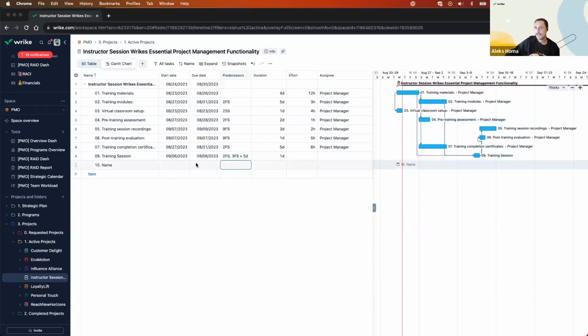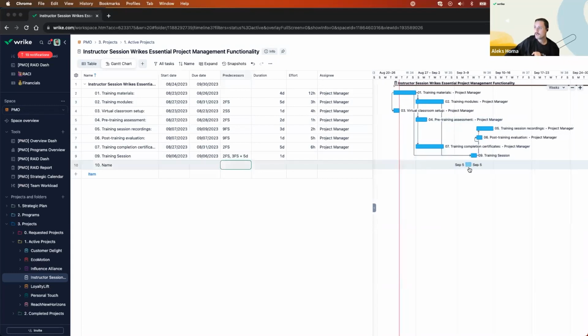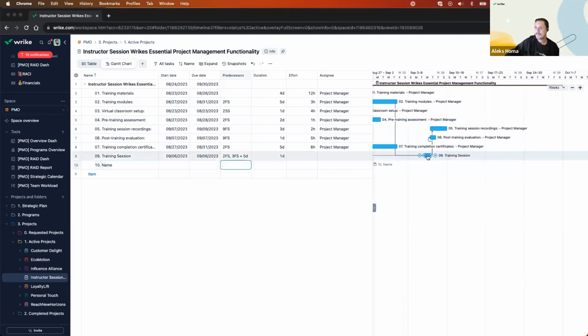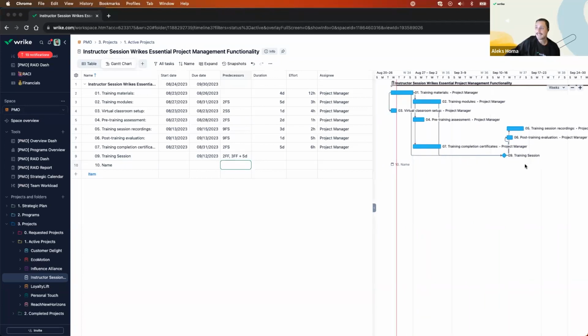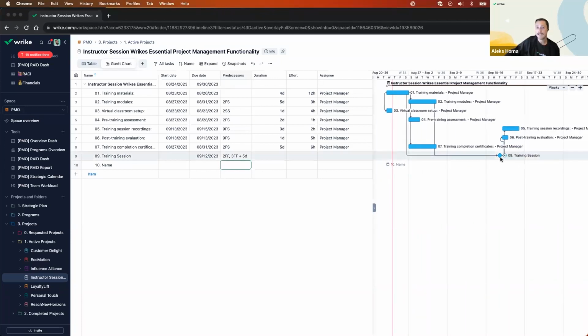Now, I said earlier that I probably don't want to make that a task, right? Given that I might want to lock in that training session, let's assume that I want to kick that session off sometime in September. Let's put this out into the 12th of September. That's when I want to make that happen. I'm going to convert this to a milestone because everything prior to that is what I have to work towards. I've got myself a bit of leeway, a bit of a gap to work on it, but that's the date that this session will in fact happen.